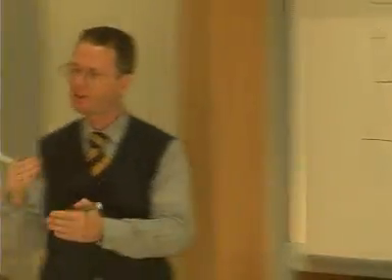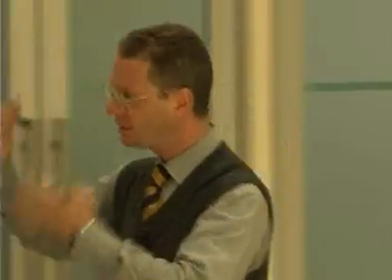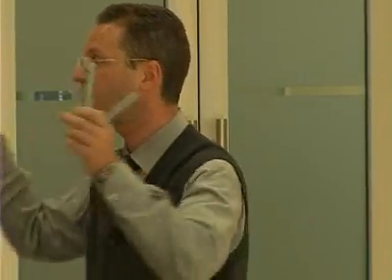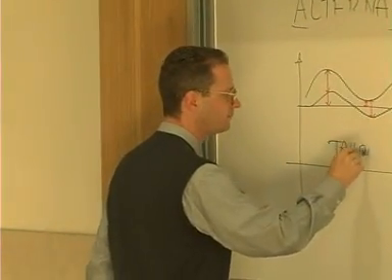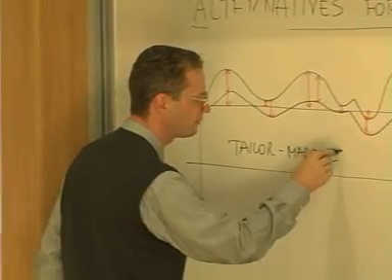Okay? Quite easy. A sort of loan that repays different percentages of capital in different years is often called a tailor-made repayment schedule. I mean, it is a customized repayment schedule. It is a schedule that will require you to pay a higher percentage of capital in years where cash is really abundant, and to pay a lower percentage of debt repayment in years where cash is particularly scarce. Okay? And so, this is a so-called tailor-made repayment schedule.